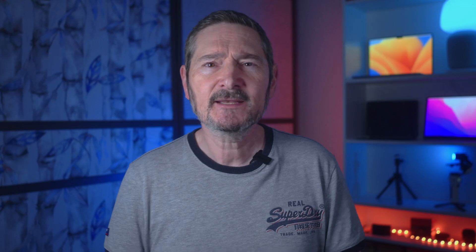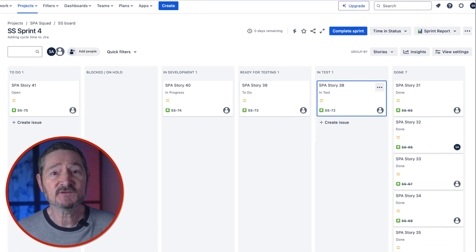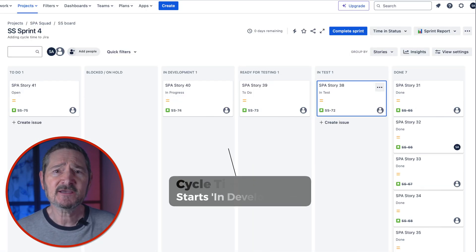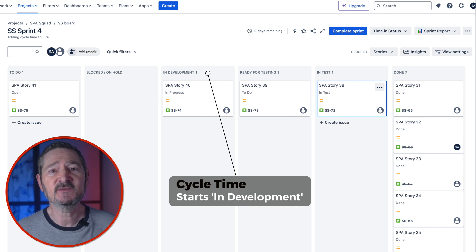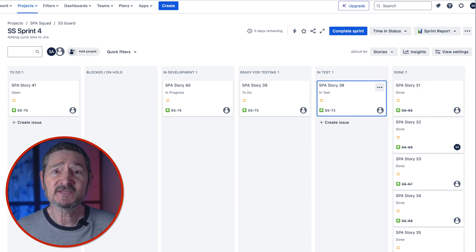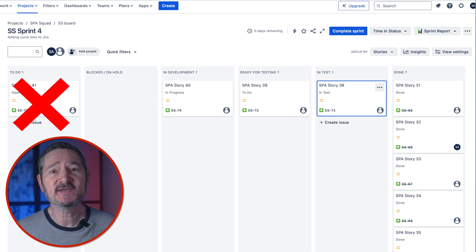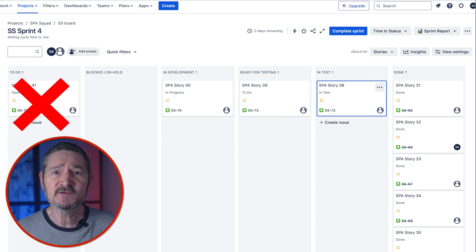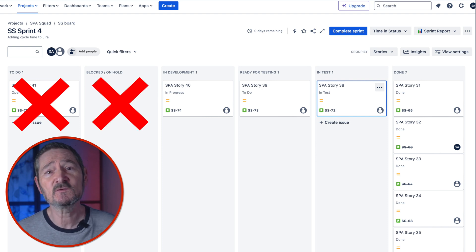So how do we get the data needed to calculate flow efficiency? You need to use wait states or inactive states in your workflow. I'd recommend creating dedicated wait states as columns, such as 'Development Done' or 'Ready for Test.' In this example from Jira, you can see workflow states: To Do, Blocked On Hold, In Development, Ready for Testing, In Test, and Done. Cycle time starts only when a story first enters development and ends when the story enters Done. We exclude To Do because when a story is in To Do, we're not actually working on it — it's queued up, ready to pick when we have capacity. We also exclude any time a story spends in Blocked On Hold, as this is also an inactive state.